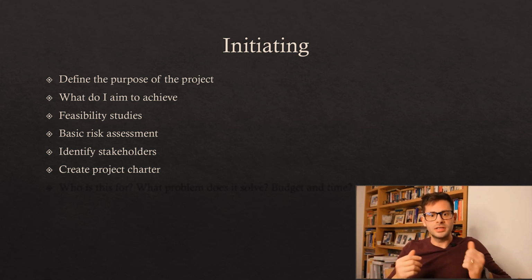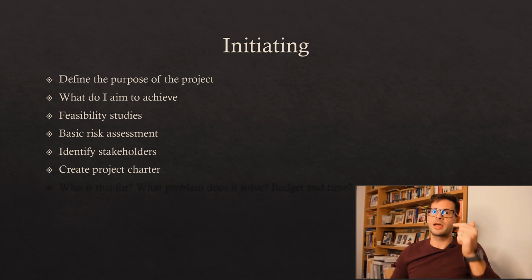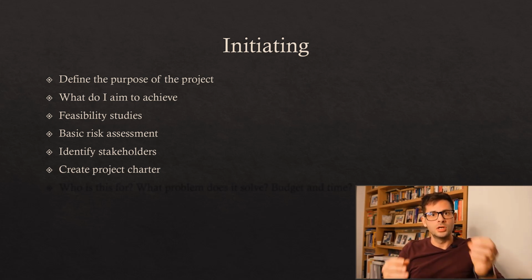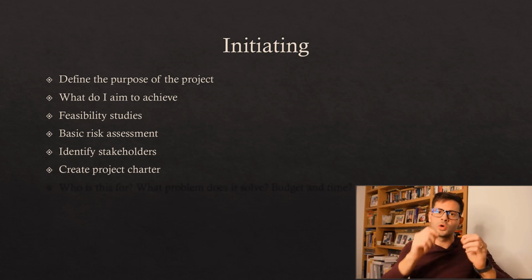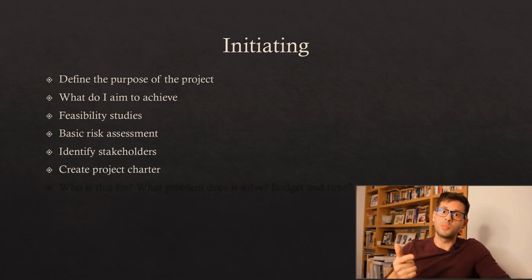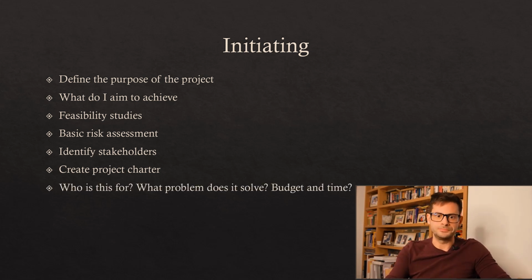When we identify the stakeholder, then we create the project charter. So if I know my purpose, if I know my risks, if I have my feasibility study, if I know who's interested in the project, then I can create the project charter. The project charter basically says what I'm trying to achieve, who is the sponsor and is paying for it, and it also gives you authority as the project manager in order to lead it.